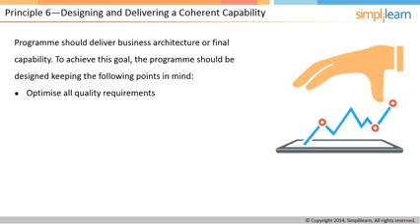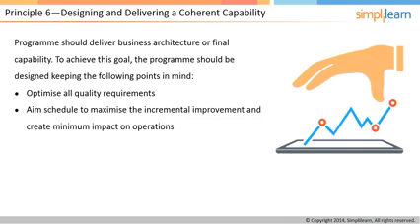The program should be scheduled in such a way that it maximizes the benefits and reduces the impact on operations. Ideally, no delivered outcome should be unutilized in a program. The schedule should aim for maximum incremental improvement in a program when put in operational use.